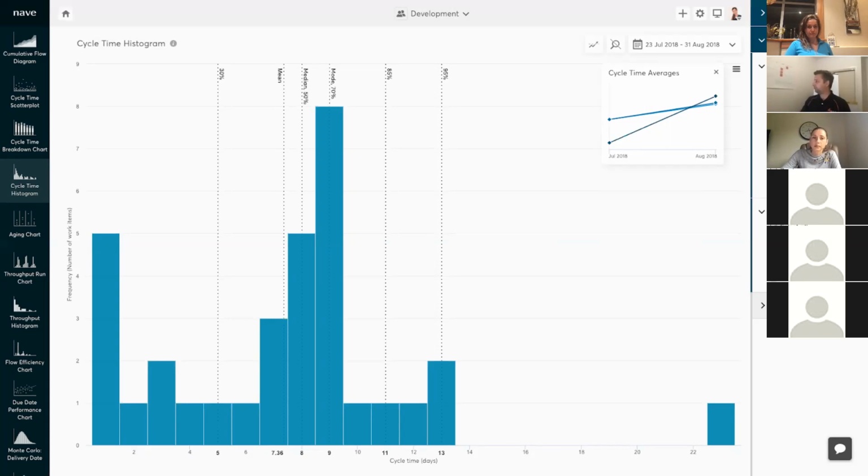Average cycle time is a measure of performance. In this chart, we show the mean, median, and mode average cycle times and how the trends build over time. Ideally, the lines should be close to each other, stay even, or go down. If the values are going up, then you might need to reevaluate your work in progress limits or alter your process policies in order to establish a faster delivery workflow.